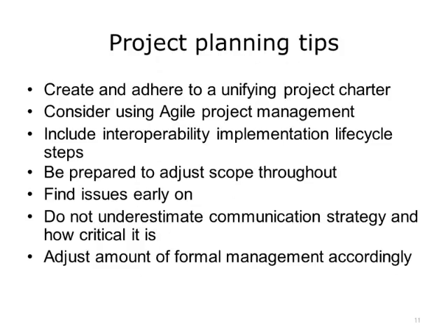A tip for planning an implementation project is to create and adhere to a unifying project charter. Since the project spans departments and organizations, it is especially important to have a shared vision. Consider the Agile method for implementation, which allows you to quickly prototype solutions. End users benefit from prototyping so that they see how interoperability will work. Also, since the project has hidden complexities, breaking it into smaller, prioritized projects makes sense.